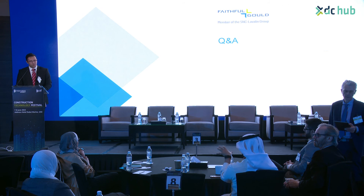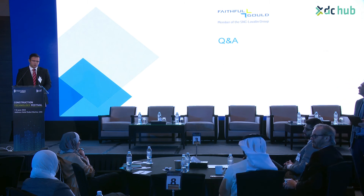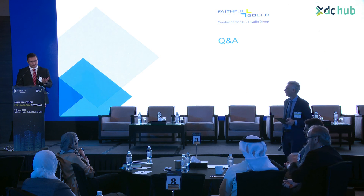Audience question: As a project management company - Faithful and Gould - how do you integrate contractors to this platform? You're technology-savvy from a PMO perspective, but how do contractors in this region adapt to your technology platform? Answer: We create standard templates for Excel, P6, MS Project, and everything else. We determine WBS structures - everything is ingested in a standard form through data structuring. We can then give contractors access to upload data so everything is visible to everyone, including the CEO.